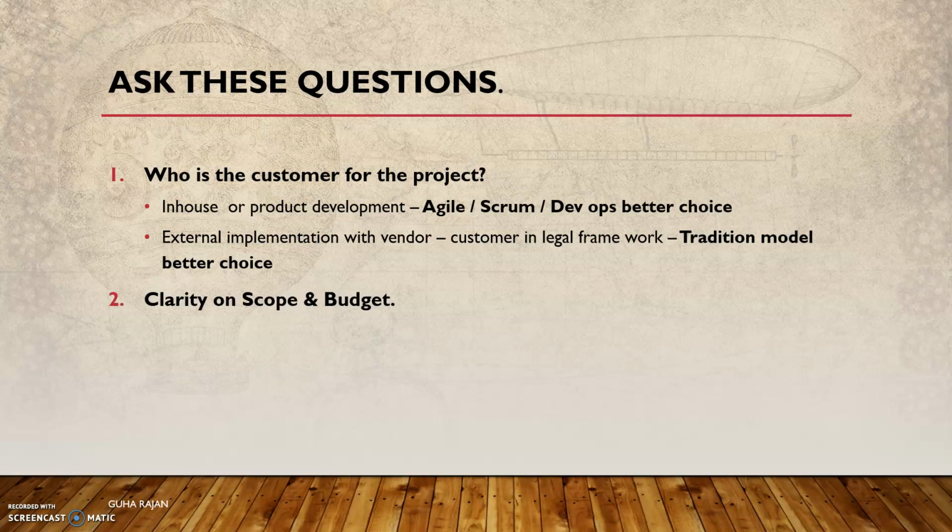If the scope and clarity are better, then go for the traditional one instead of just getting into the agile one. But if the scope and budget are very fluid, it's all market driven, and we will be changing the scope as required based on the business, then yes, it's better to go for the Agile or Scrum type of project work.